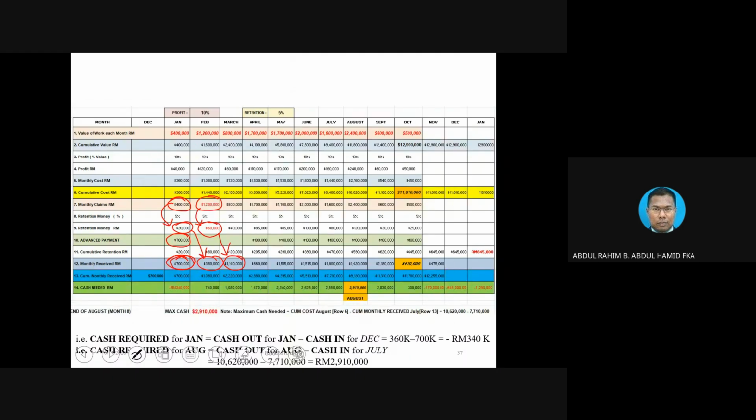Okay, then April here. This you need to pay attention. 660 here. Where do we get it? Remember from the previous month, March, 800,000, deducted with 40,000. 800, if you do the calculation, minus 40 is only 760. But our answer is showing 660, missing 100. Where does 100 come from?